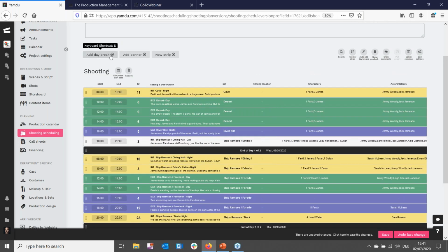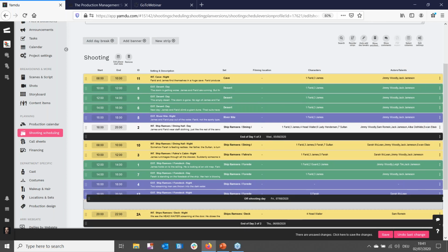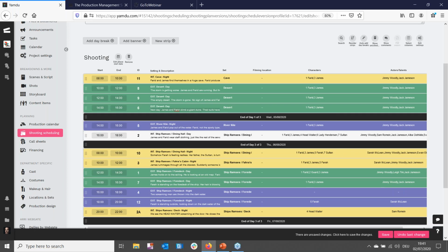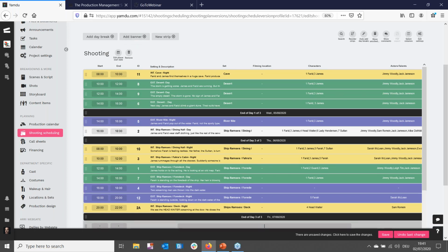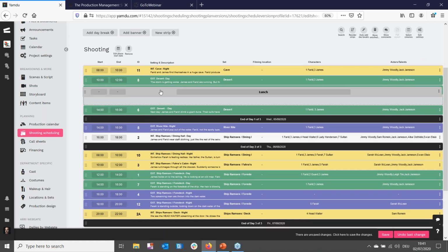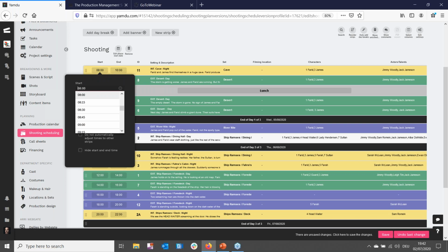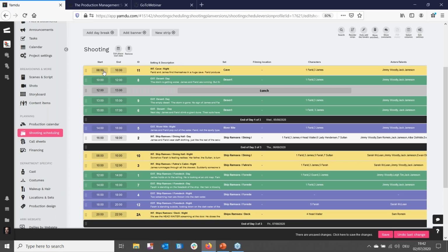And of course, I can also add daybreaks manually. I can just add one here and I can drag it up wherever it needs to be and say that, okay, my first day shooting are these 4 scenes right here. And maybe I also need something like a lunch break, for example. I can add that at the right point in the day. I can change the start time and the end time. These will be dictated by the estimated time that I choose for each of the scenes that I work with. So again, whether it's scenes, content items, or shots, we can mix and match all of these different types of content right here.